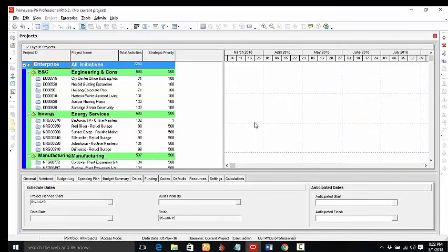Now, the next thing we need to do is to display the currency. Note that creating the currency is different from displaying the currency. Displaying the currency would mean that in the course of our scheduling, when we display the cost column or anything that has to do with cost, instead of it showing in the default currency, maybe US dollar, then it can show in whatever currency that you want it to display, including the new currency that you may have created.